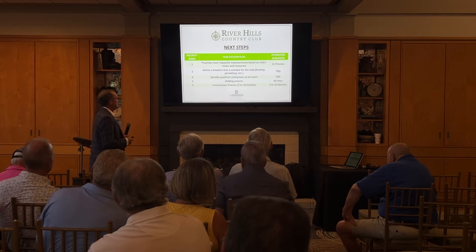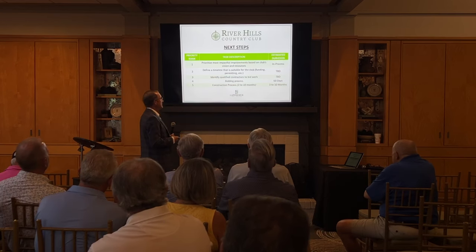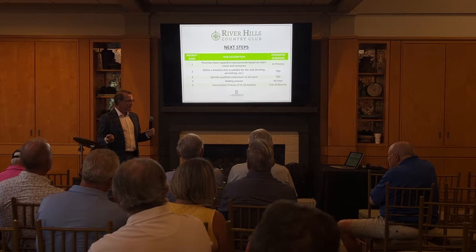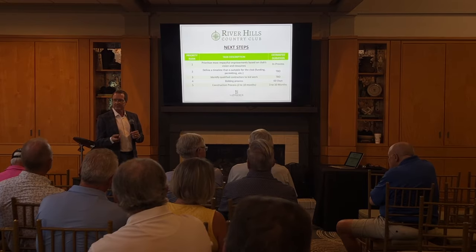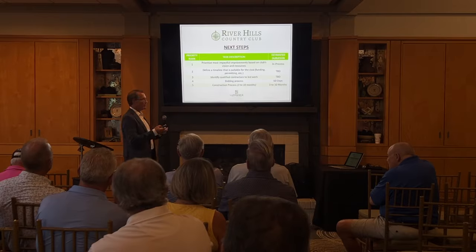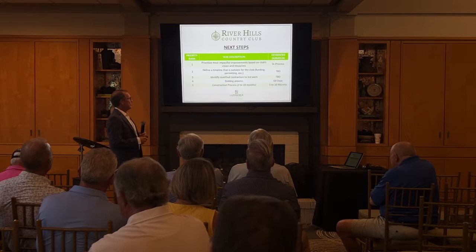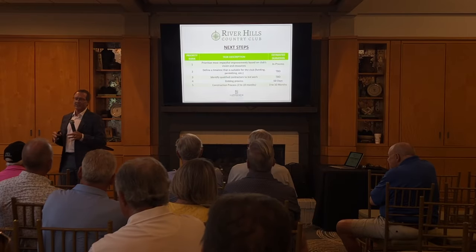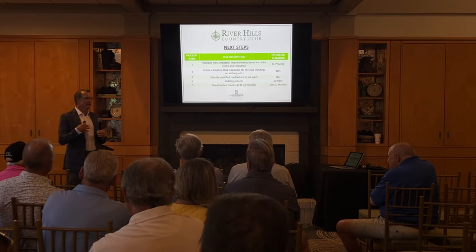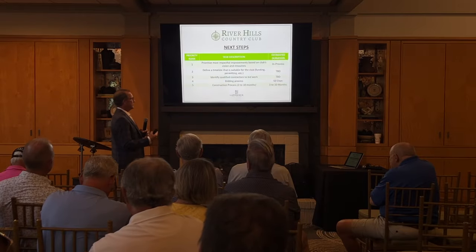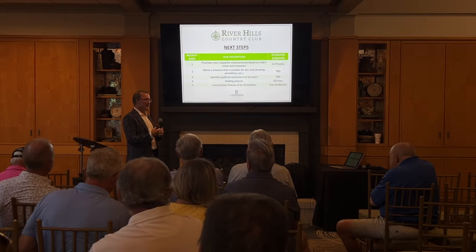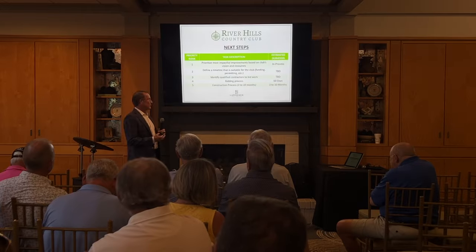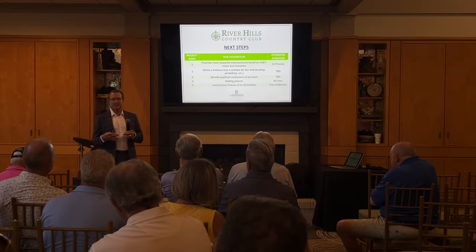So we need to define timelines that are suitable for the club. I'm guessing there's a vote in December. Is that right? Somewhere around that timeline. Once the scope of work is identified and the members vote on what they want done, then we can move to next steps. When funding is in line, we can start bidding the project, going to qualified bidders, bidding process, etc.